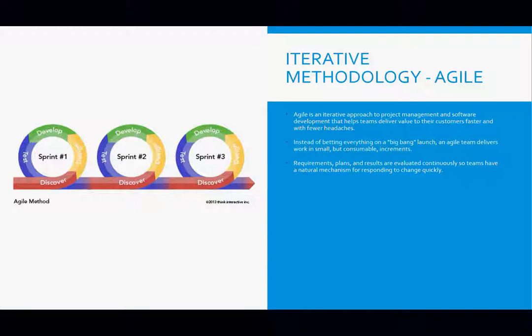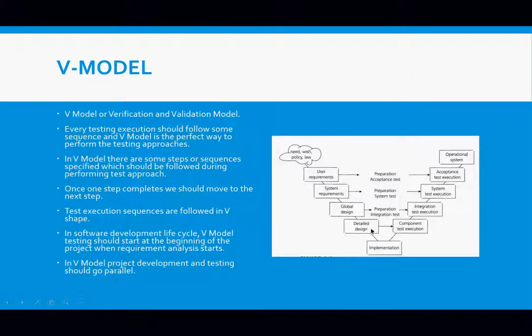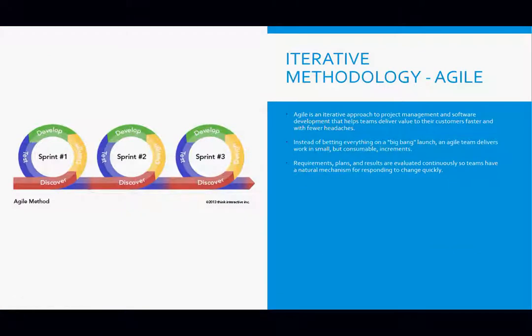But unlike what we've seen before, where the implementation of the whole system happens at the bottom part after you gather your requirements and do everything, it is not the case for Agile. In Agile, you do everything in iterations. You divide your application into different parts, and you do requirements gathering for that particular part of the product, and then you do all of this in chunks of the system. You don't do everything in a big bang like we've done in the previous one.